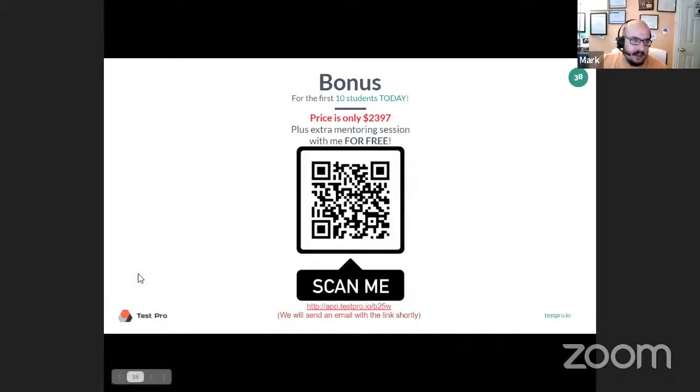And I think for the most part, I feel like we've covered a lot. Again, you can always go to that Scrum Poker. You can go online and try to do it, enter the information, and just see how it works with planning. All it is basically is a card hidden, and then you flip it over and see how many points it's worth, and then you add that together as a team of 5. When you get in your teams, you'll actually be able to do that and plan it out.